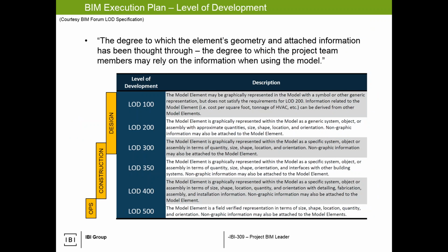We talk a bit about level of development, or LOD. And this is heavy, because this term, and I mentioned it on previous ones, has made its way into some contracts. Can you promise LOD 300? Contractors will say, can you do more? Let's make you do LOD 350. And the differentiation there is kind of what I show there.